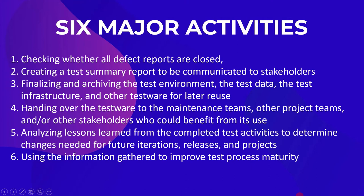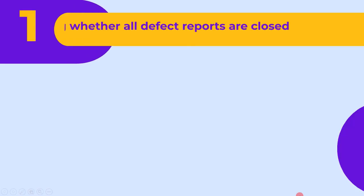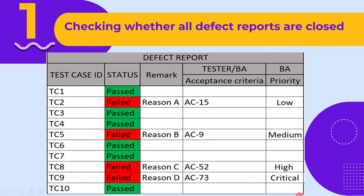Let's now understand each of these test activities one by one. The first main activity is checking whether all defect reports are closed. During test execution, we create the defect report, and in the test completion stage, we check if all the defects are closed or not. If not, we look for the reason. This is the first activity: checking whether all defect reports are closed.